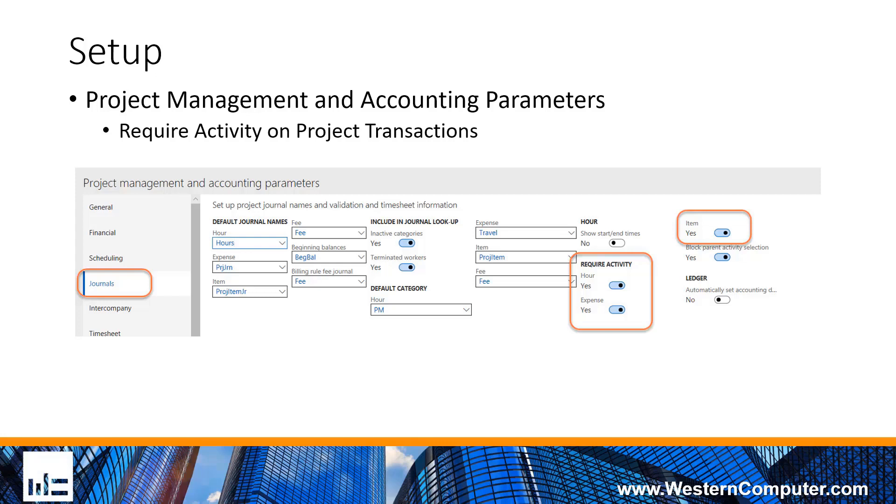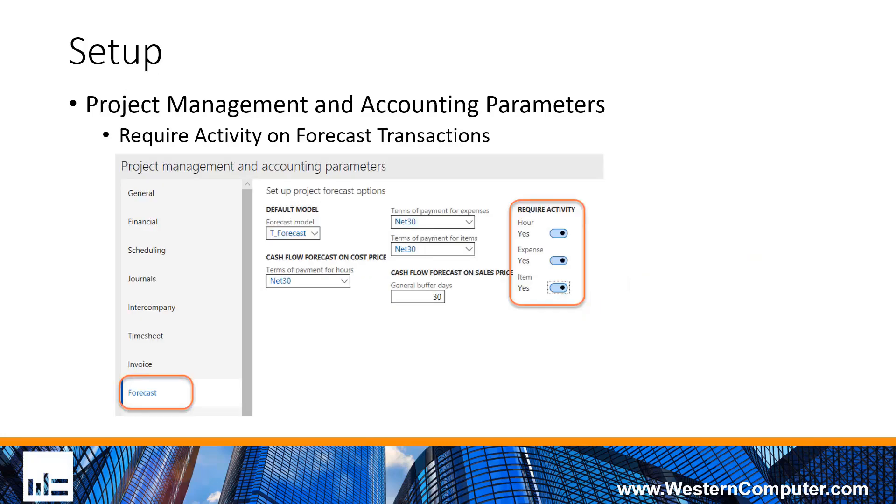The system is configurable to require the activity on transactions when you're using them. Out here in the project management accounting module for journals, we have some radio buttons that will turn on the ability to require those transactions. We have the same thing from a forecast perspective, requiring the activity on the forecast transactions. Both are found in the project management accounting parameters.